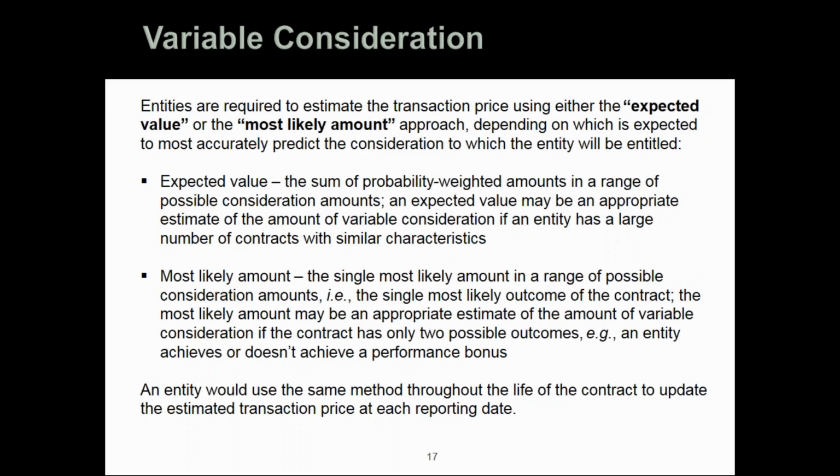An example of where that might be appropriate would be, suppose there is some incentive built into the pricing, and if you're able to complete a building, for example, prior to a targeted date, maybe for every week prior to the date, you get a $5,000 incentive bonus. And maybe if the completion is delayed, then for every week after that target date, there's a penalty that's incurred.